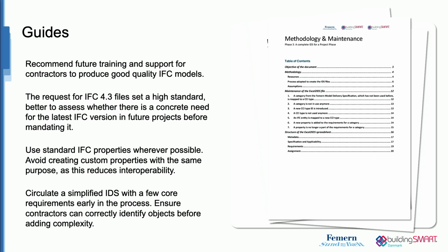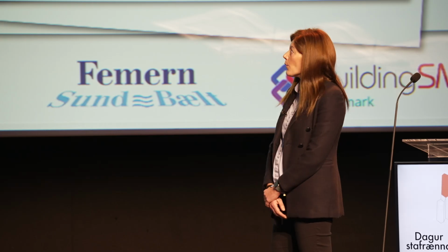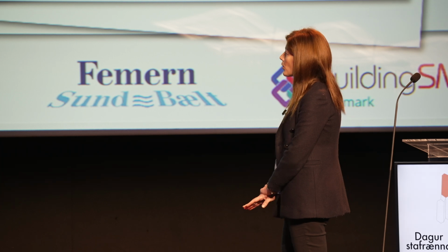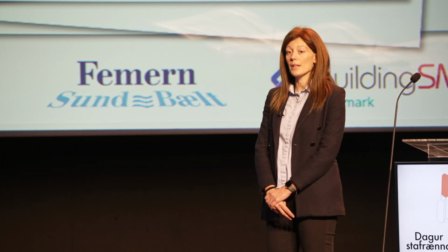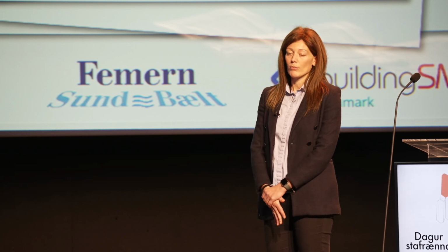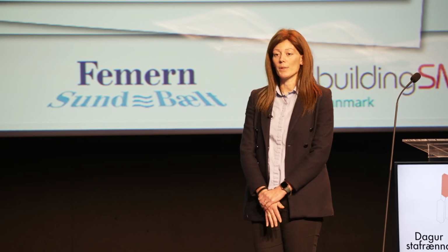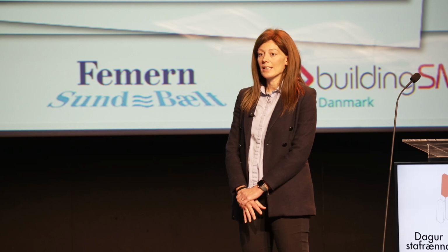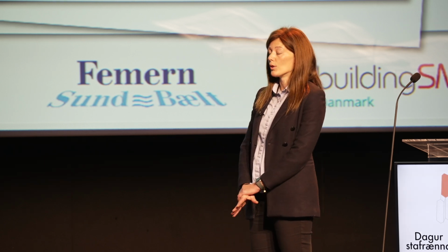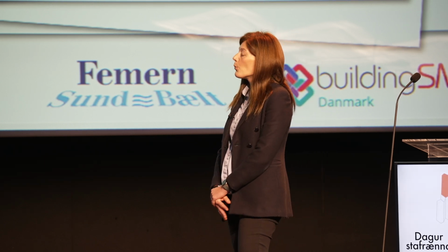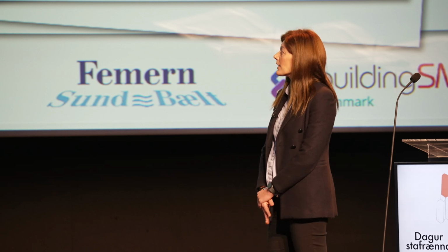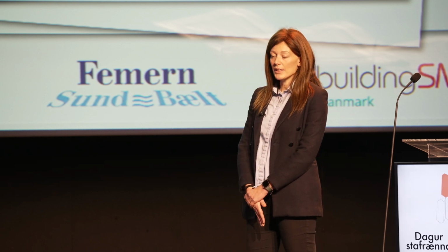The main takeaways from this phase 2 were that, as I mentioned, we have our custom properties, but we should transition, not in this project because we are already too advanced, but for future projects, and this is a recommendation that we transfer to Sunenbelt, to rely on standard properties from the IFC, because we noticed that there are some redundancies in the properties themselves.